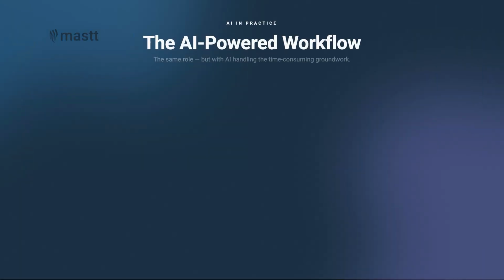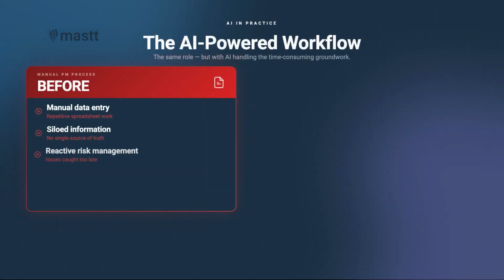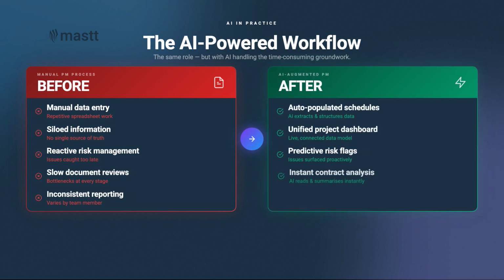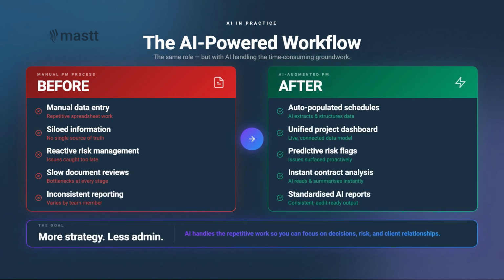That's when, prior to that instruction being received, our job is mainly just tracking and also pushing a problem to be solved, should we say? Yeah. But as soon as we receive that consultant's advice notice, there's a marrying up of: here's the RFI, here's the response. Then we look at it with what I call the human in the loop kind of look, where we usually code them as no cost, or has a cost, or has a cost plus time. And that's usually the first flag.